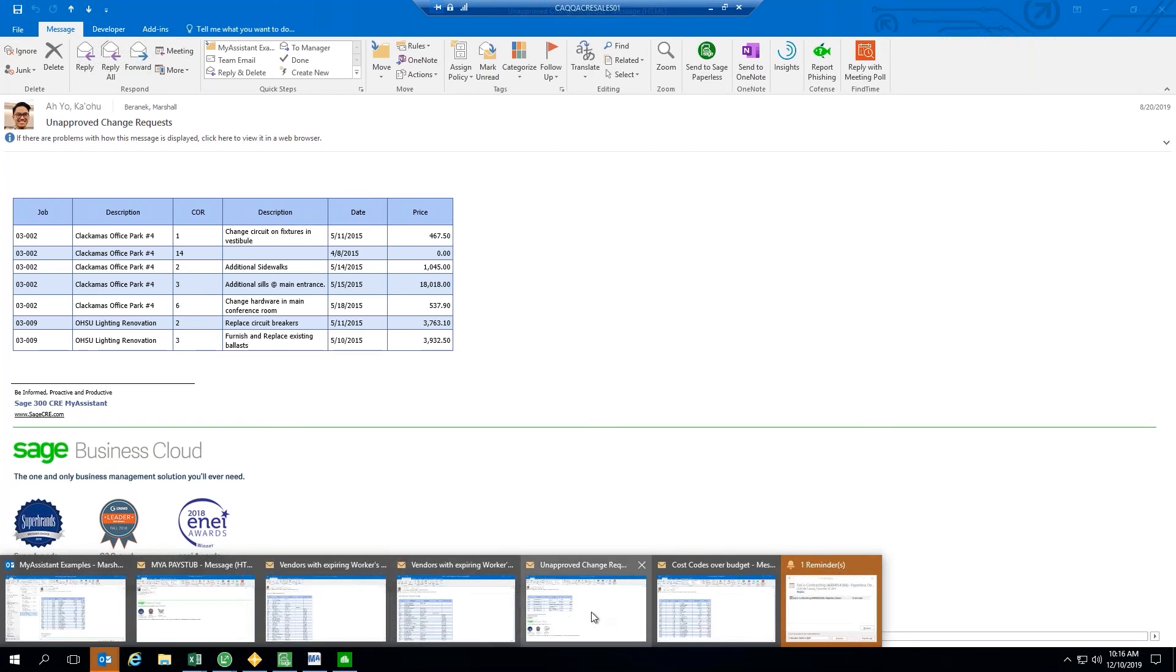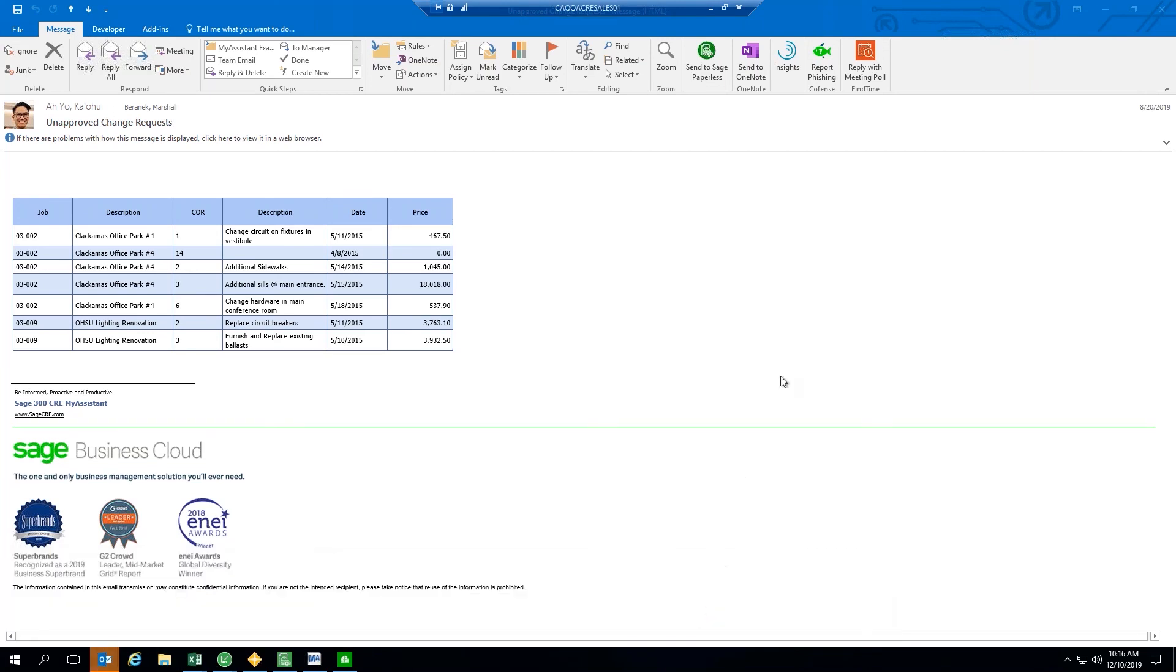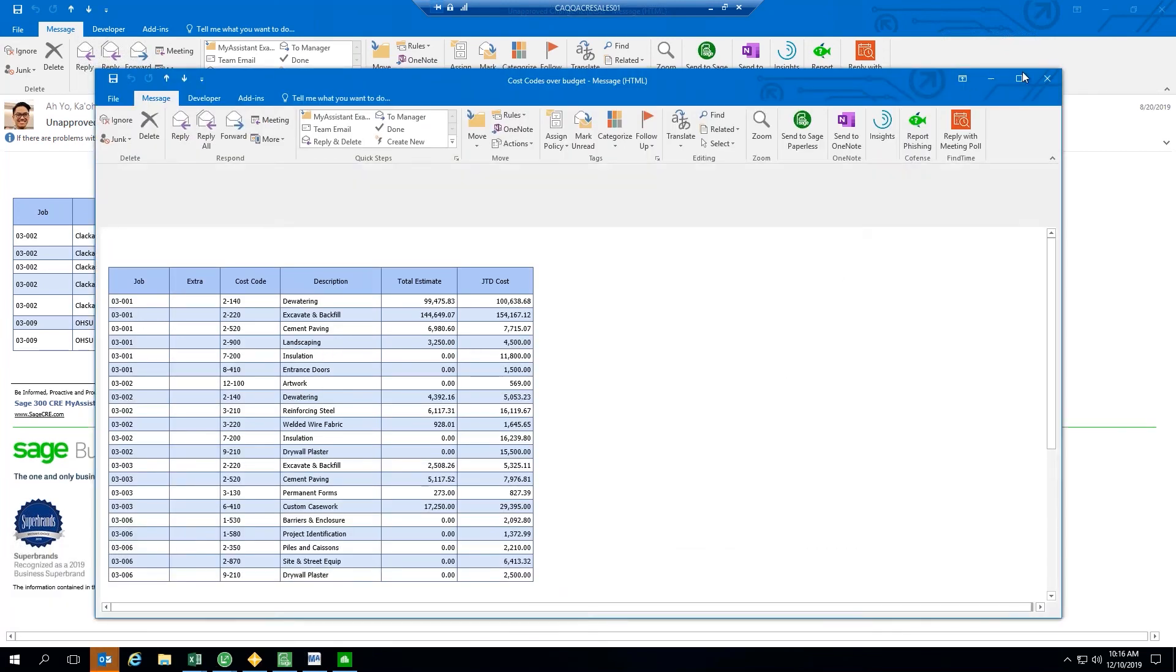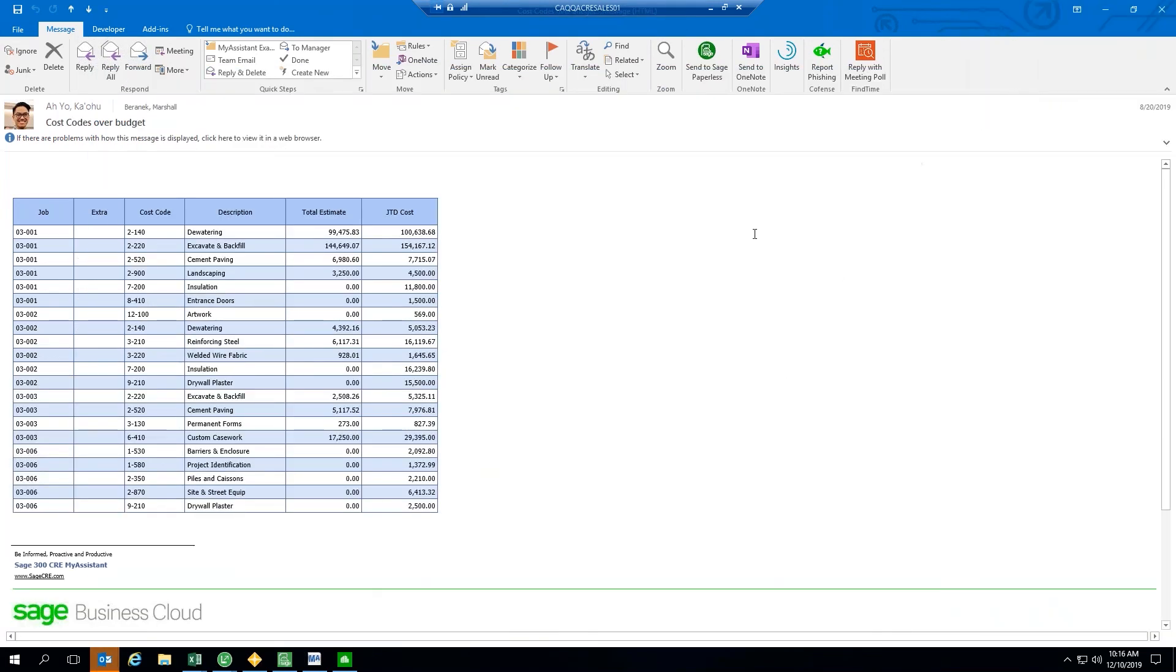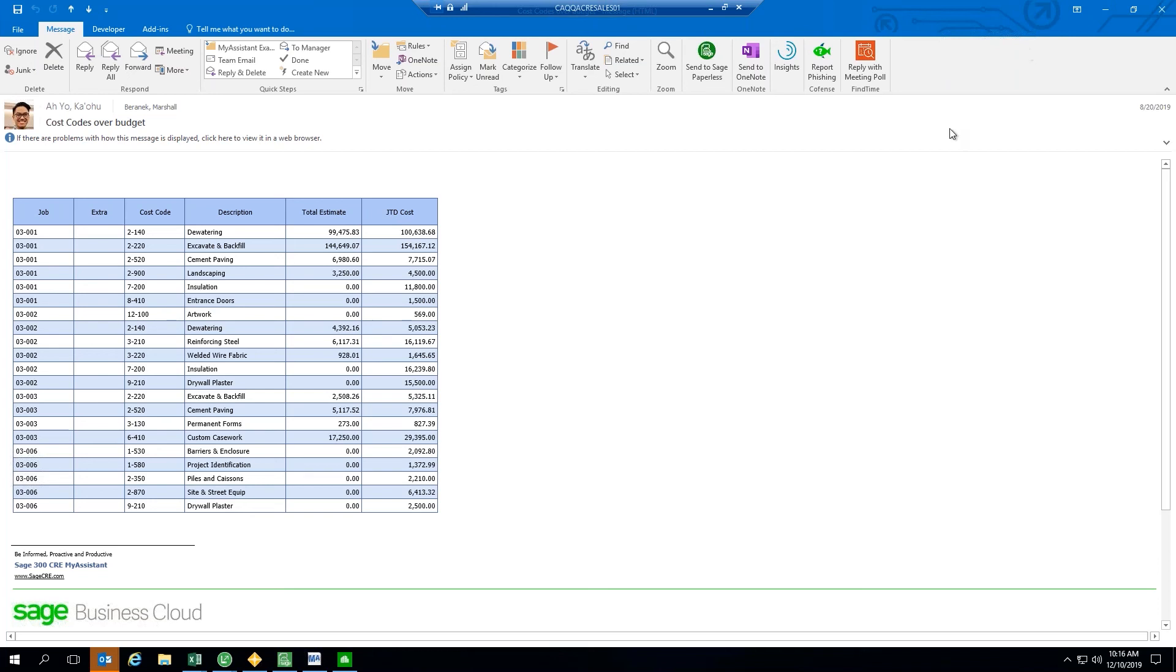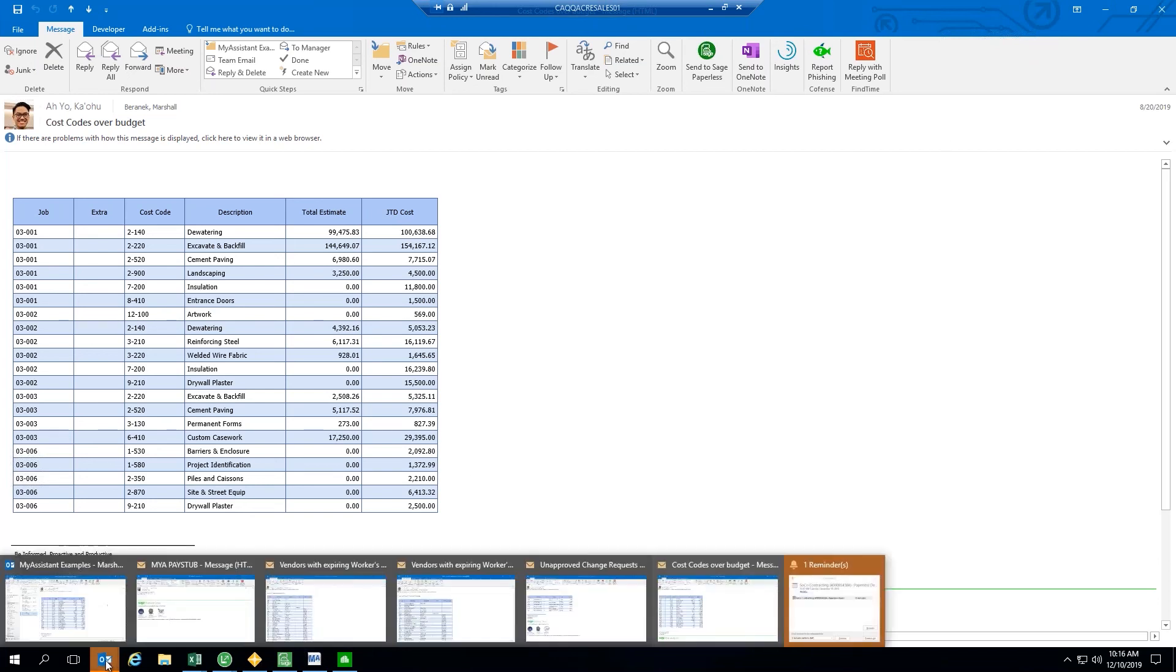Another one that I'll show here today would be cost codes over budget. So, perhaps your project managers would like to be notified if they have a particular cost code that's running over budget for their jobs. This particular list is returning that estimate versus the job-to-date cost and just returning those that the job-to-date cost has exceeded that estimate. So, these are all just examples of different reports that can be sent.